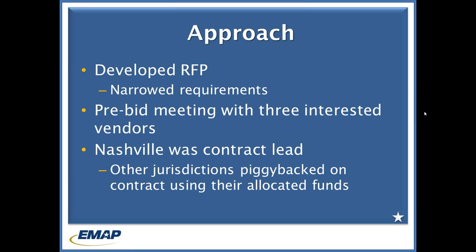And I'll go ahead and pause right here and say that whenever a contractor is brought into a performance-based project like this, one of the things we highly recommend is to have these deliverables built in, not just into the scope of services, but also on the payment schedule, so that they know unless certain things are delivered on time and per the scope, they will not get paid for that phase of the project.